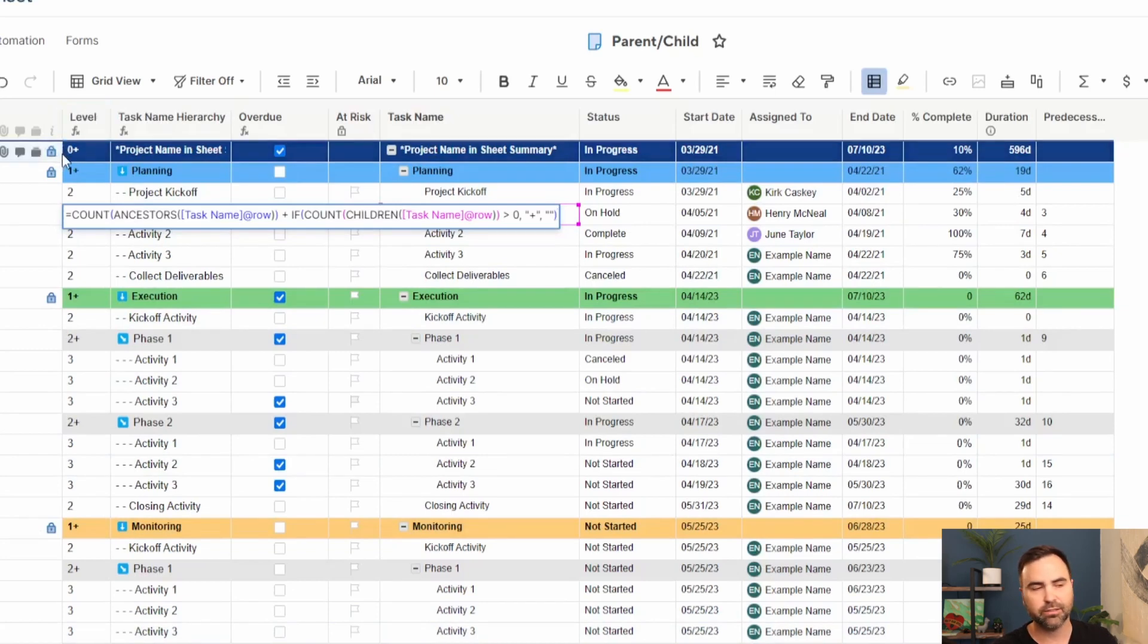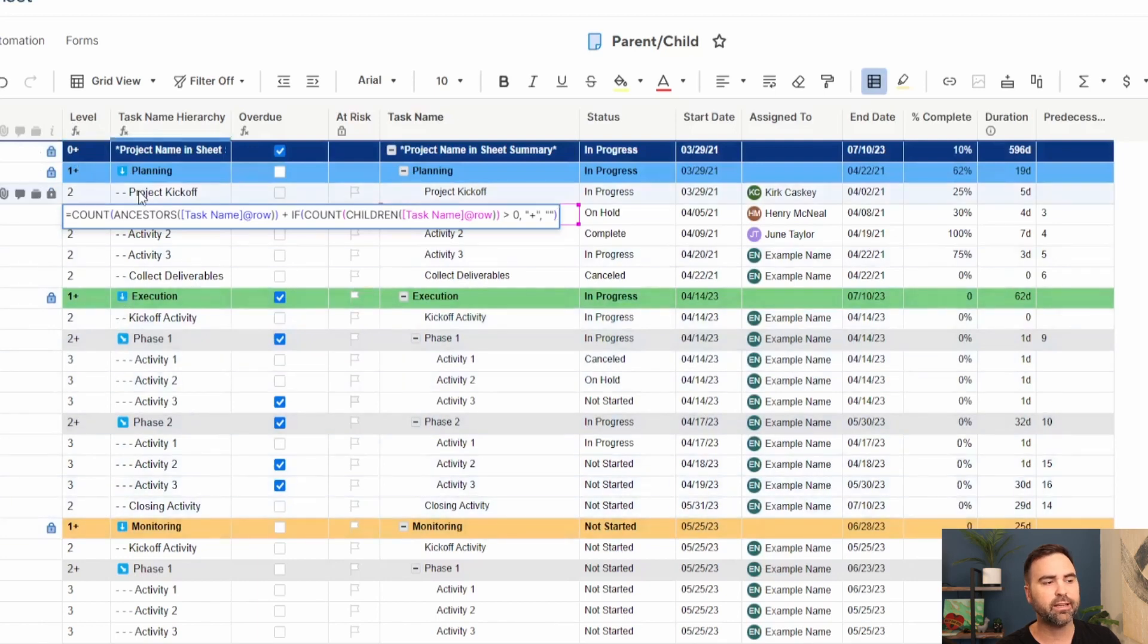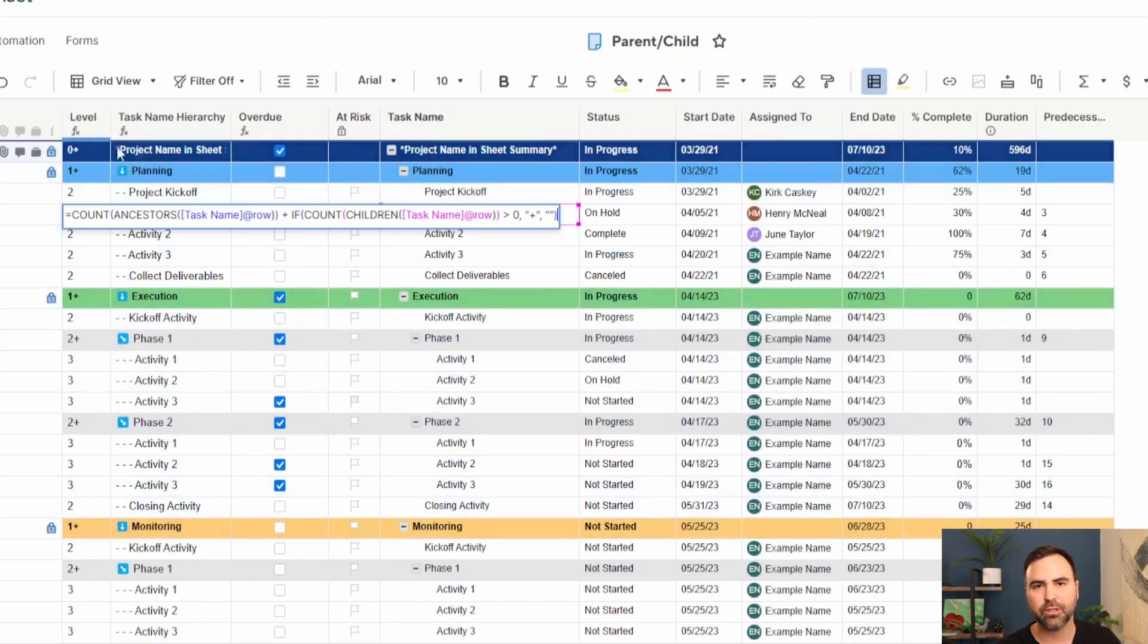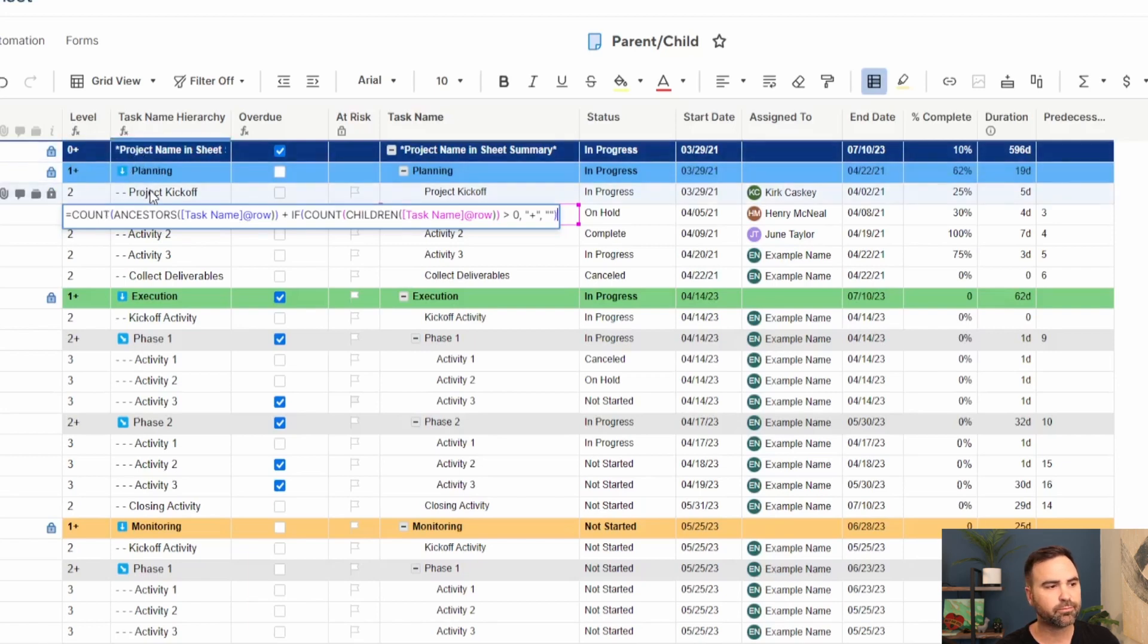If the current row has ancestors, then it's going to count them and put them in that level column. You can see at the top, zero is at the very top because this guy has no ancestors. That's as high in the hierarchy as you can get. Planning, execution, monitoring, they all have one ancestor, which is this project hierarchy ancestor at the very top.